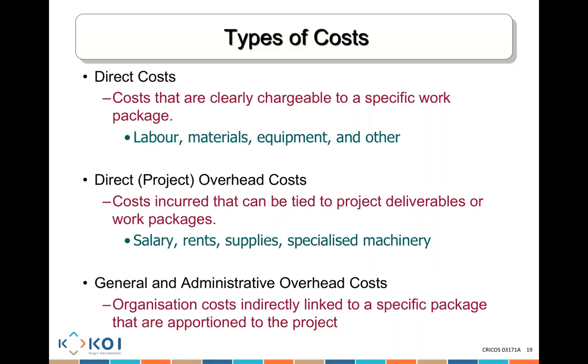For example, I have a project management office in the organization. This project management office creates a lot of reporting and a lot of development for how we do project management better. They teach us and do things. What is that? Well, if I have 10 projects and this project management office costs us $10,000 a month, we split that $10,000 across all of the projects that are running at any point in time within our organization. So all of these are linked together.